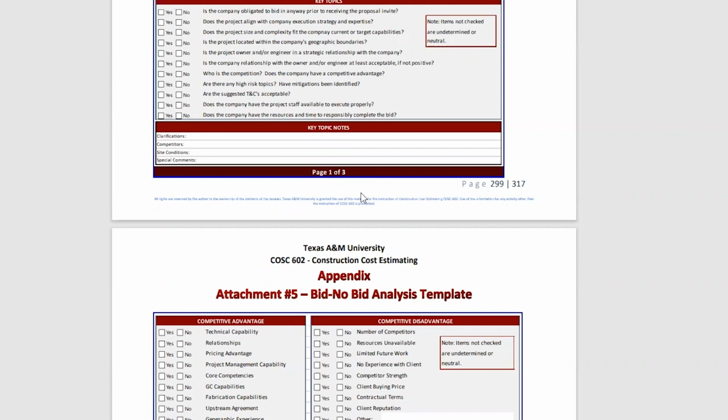And if your processes and your people aren't trained to know the documents very well and say, there's a hole, and now let's leave the cost out when we bid it, and let's know that's there, and let's manage a change order to cover that cost, then you'll never get the money back.